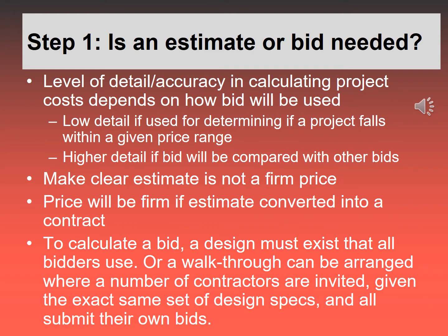Another thing that distinguishes an estimate from a bid is that a bid is much more detailed and more comprehensive, really itemizing everything. An estimate is more general. It does include costs of materials and labor, but it's more general. Again, the estimate means you're giving the client a general idea of what it will cost, but there's a range that it could cost. It's not one number.